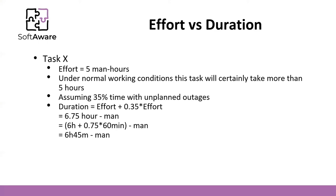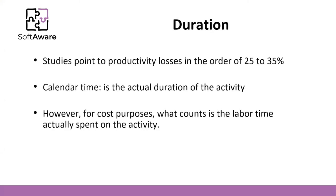In week one, two hours; week two, two hours; week three, two hours; then 45 minutes remaining. You would tell your customer the duration is almost four weeks, while the actual effort is five hours. This reflects predictive productivity losses of 25 to 35%, which is why the 35% value is used.